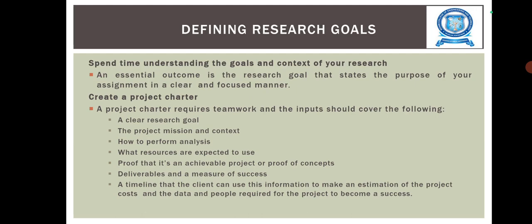Next we are going to see how to create a project charter. It requires teamwork, and your input covers at least the following: a clear research goal, the project mission and context, how you are going to perform your analysis, what resources you expect to use, proof that it is an achievable project or proof of concept, deliverables and a measure of success, and a timeline.